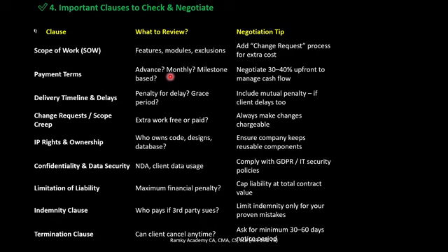For example, for the October month, 1st October to 30th October, you will issue the invoice on 31st October and it will be delivered to the customer. And the customer has to make the payment from the date of receipt, that is from 31st October, within 30 days. That means before November 30th, he has to make the payment to the supplier.